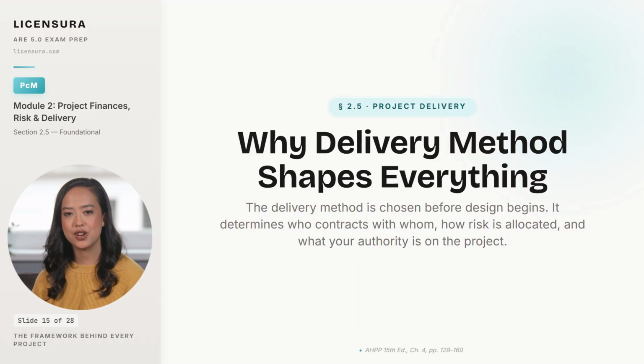Most architects treat the project delivery method as a procurement decision the owner makes before calling the architect. That framing is exactly backwards. Delivery method is the structural decision that determines the entire project. Who contracts with whom, when the contractor enters the picture, how risk is allocated between owner and contractor and architect, what authority you actually have over the work in the field, and at what point the owner finally knows the price.